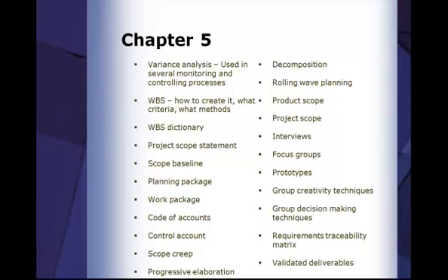If you've got a 1.1.1, what level WBS is that? If you've got a 1.4.1.1, what WBS level is that? That's a level 4. So you count the digits to get the levels. Remember that. You can also look at the WBS and eyeball it and immediately identify how many levels are in it. Very important to do.